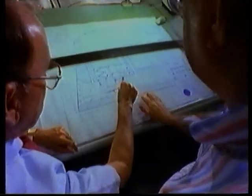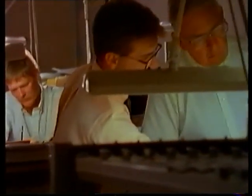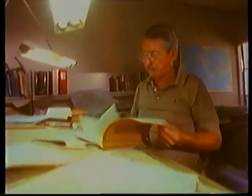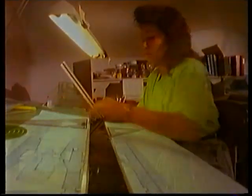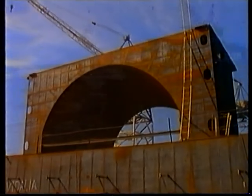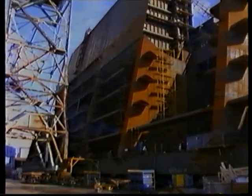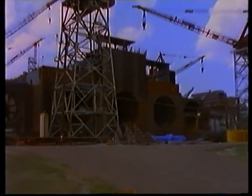A major consideration during the preparation of the specification by the Baton Rouge consulting engineers Fenty and Tablada, working with Sogreah of France, was maximizing the annual energy output and minimizing the construction time. The radical method chosen was to prefabricate the complete power plant in steel at a shipyard in New Orleans, whilst more than 200 miles upstream, the civil construction work was being carried out at the site. Once the prefabricated powerhouse structure was fabricated and fitted out, it would be launched into the river and towed to site. The world's largest prefabricated power station.